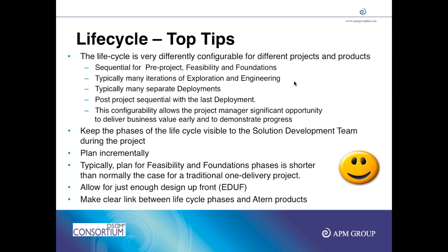The planning should be done incrementally, that is, like the releases and the features that make them up. Usually we do enough design upfront during foundations and work on the details, that is the depth of solutioning and efforts and so on, as part of exploration and engineering. You can tailor both exploration and engineering to combine, or they can be used separately. Apart from that, pre-project, feasibility, and foundations can also be tailored to be combined for projects that are small and internal.